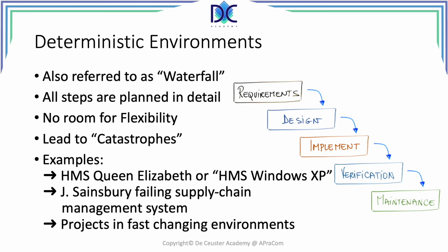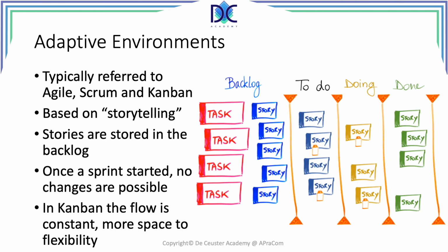In general, a waterfall approach is not the best way to deal with projects in fast-changing environments. When the scope is not well defined and many changes can be expected, the waterfall approach is not recommended. Although the waterfall approach provides nice schedules and planning, practice shows us that these charts and prognoses are not necessarily representing the truth and create a nice feeling. When applied in the wrong situation, the planning obtained using waterfall will be merely a fairy tale with a bad ending.